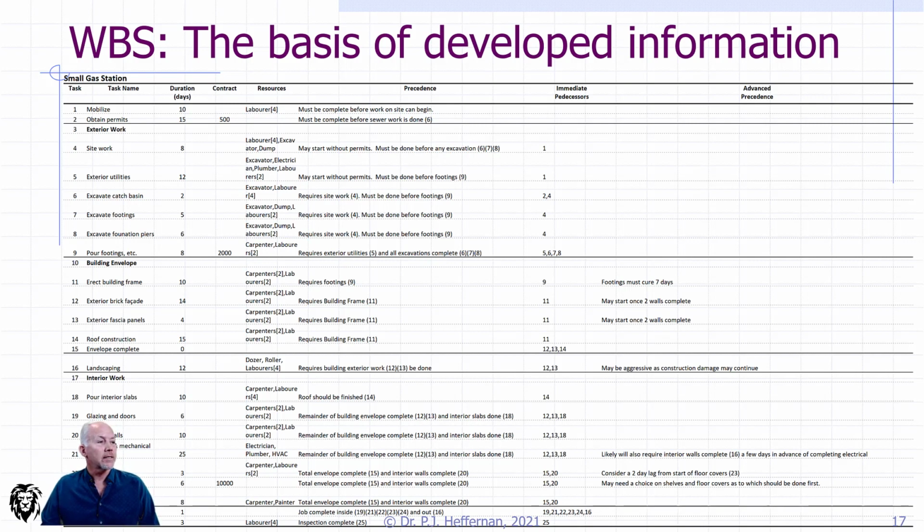And it is absolutely essential to identify the precedents. What activities need to be done before it? What activities should immediately follow it, if any? Normally we talk about precedents: what does it have to follow? And then other activities will say, well, what has to follow it? And this might be one of those. That will build the network overall. In this case, that falls out into immediate precedence based on the task number. And if you do it in this format, the nice thing is that you can throw that directly into Microsoft Project and it will build your network for you.